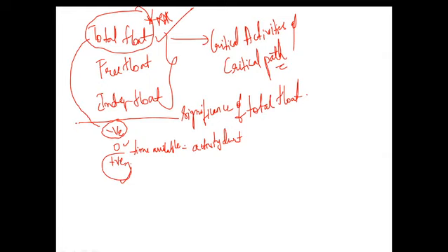As I have said, total float gives us the information about critical activities as well as critical path. Negative float results when activity completion time is more than the available time. Such negative float indicates an abnormal situation requiring a decision on how to compress the network.